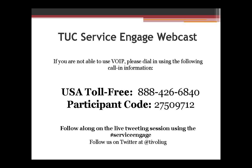Yeah, the basic goal there is to maximize throughput of work, because what oftentimes happens is that if you start a bunch of things in parallel, it feels good because you can report that I'm working on these 20 things, but they end up completing slower in the grand scheme of things because of the cost of task switching, like remembering what you were working on and the other thing. It's better to focus on one thing at a time, knock it out with high quality, and then go on to the next thing.